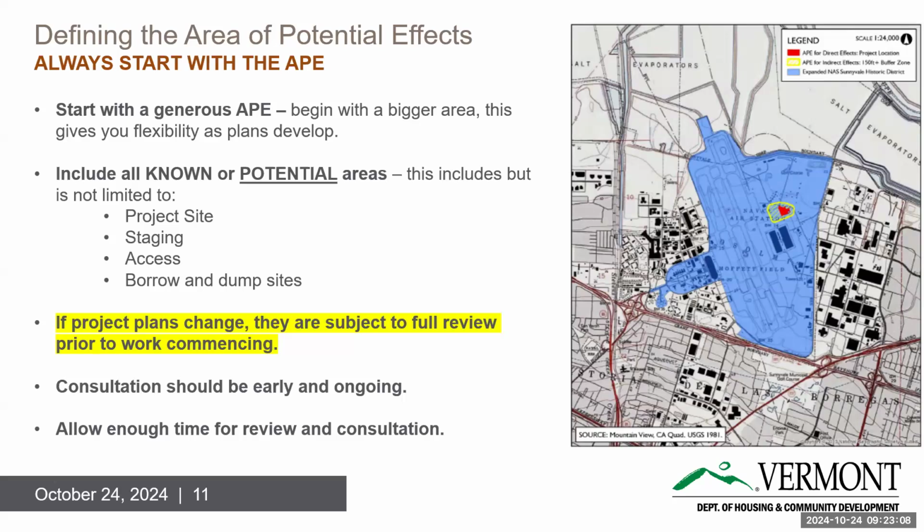If the project plans change, the review needs to happen again. And it doesn't need to be a full-blown 106 review submittal like before. It's here's what's changed, here are the project plans, here's our recommendation or determination for the impacts, and we think we're still good to go. But as things change, we continuously need to be updated and reviewing and consulting. And again, the more often you come to us, the better.